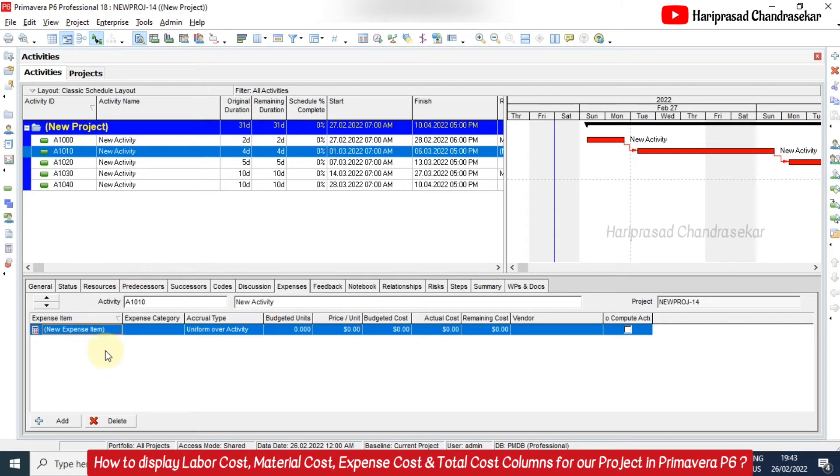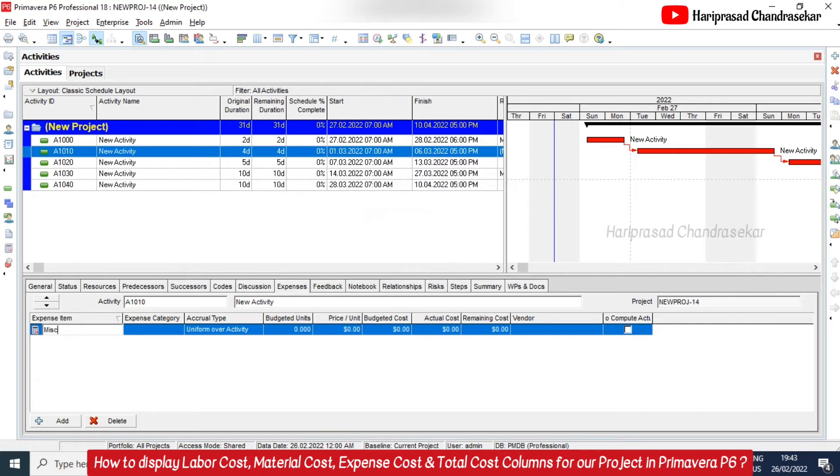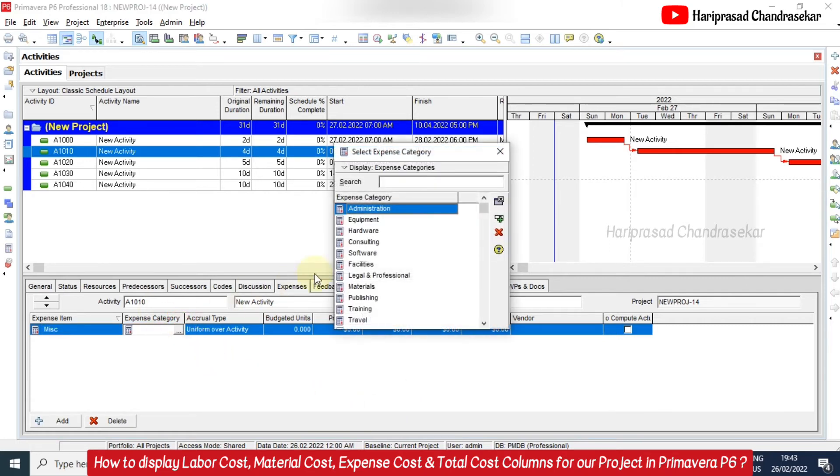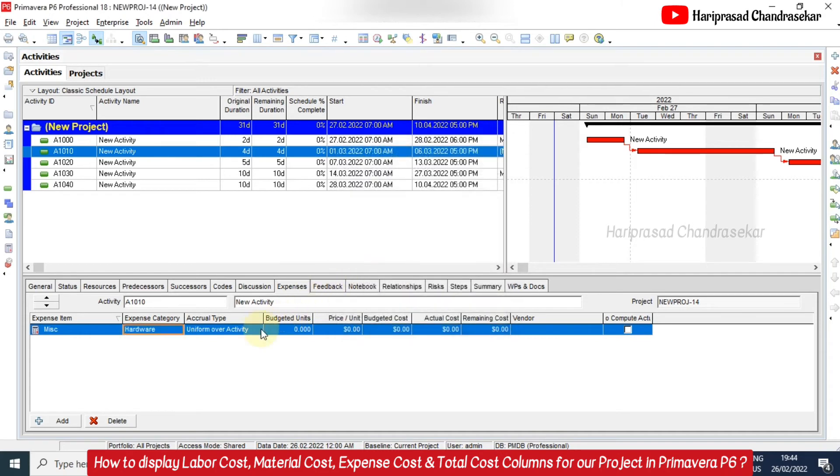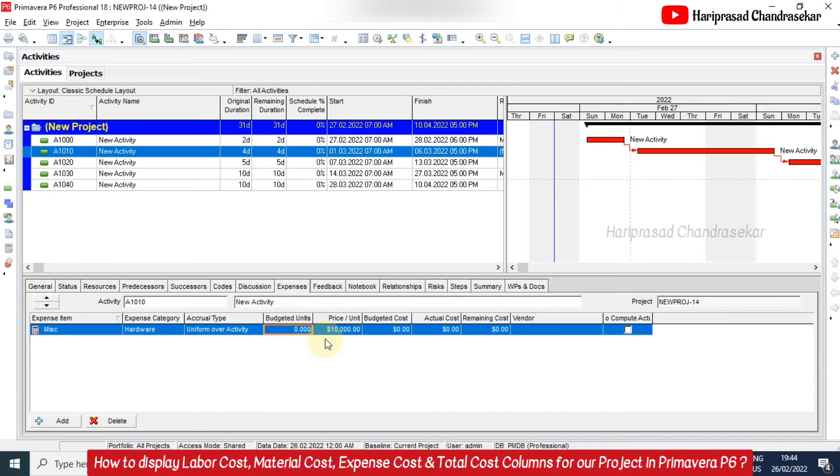So for example, for this I have added a new expense item. So like this we can add or delete. I will add again. I will put some miscellaneous and I will select the category, something like hardware. And we can also select the accrual type. I will select by default uniform over activity budgeted unit and price per unit. So I will put some ten thousand. So budgeted unit I will put one. So it will multiply and then it will show the budgeted cost.